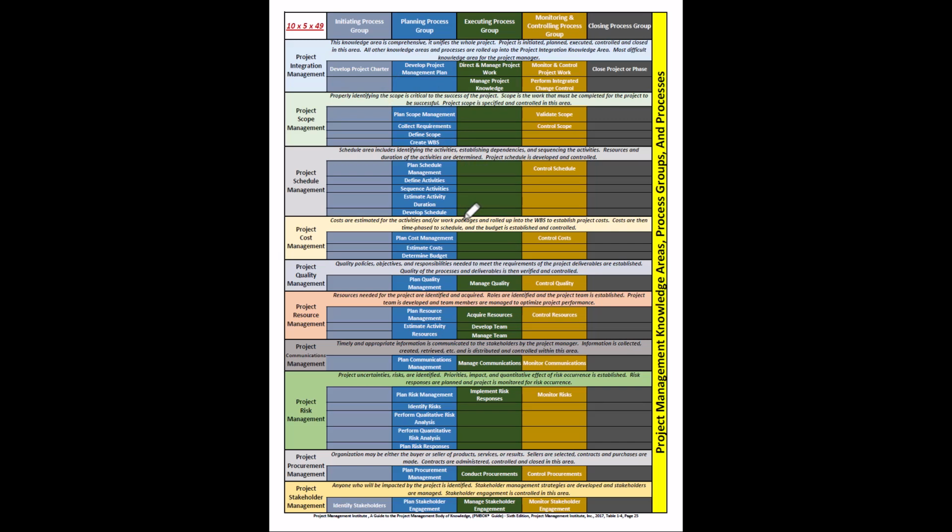The project schedule is made up of three different types of schedules: the Gantt chart, the milestone chart, and the project network diagram. Of course, senior management would typically want to see the milestone chart. Functional managers and maybe the team and project manager would want the Gantt chart. But certainly the project manager and the project team want the project network diagram.